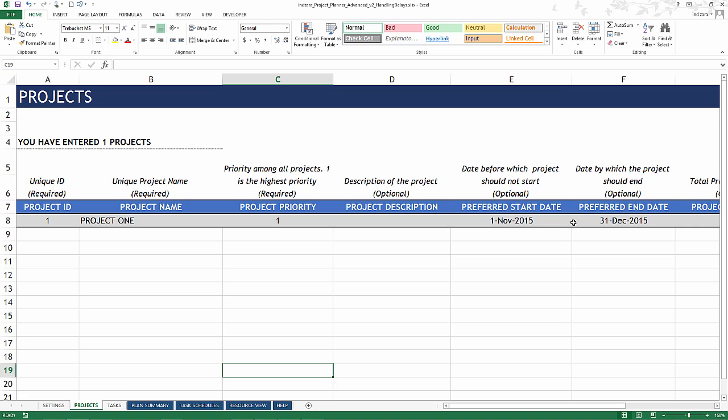Preferred end date is the date by which we want the project to finish. It doesn't really influence the project scheduling engine in this template. It is there so that you can compare whether your plan says that your project will complete by December 31st or not. If it doesn't, then the template will indicate that your project will be late. If it does, then the template will say your project will be on time. So that is the main purpose of the preferred end date, so you can easily identify which projects are being delayed relative to your preference.